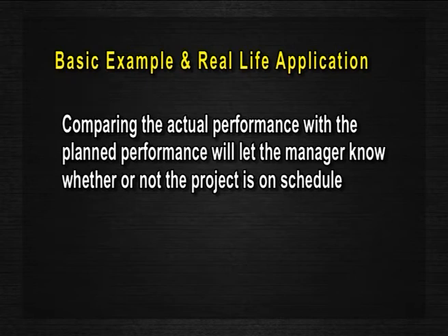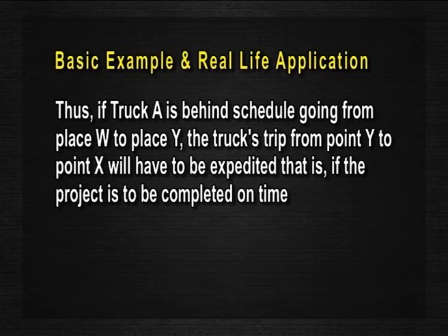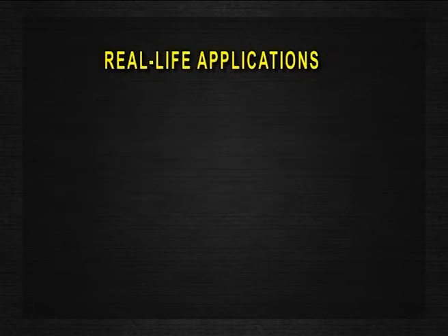Finally, by using CPM, the manager can control the project as the tasks are being completed. Comparing the actual performance with the planned performance will let the manager know whether or not the project is on schedule. Thus, if truck A is behind schedule, going from place W to place Y, the truck's trip from point Y to point X will have to be expedited. That is, if the project is to be completed on time.